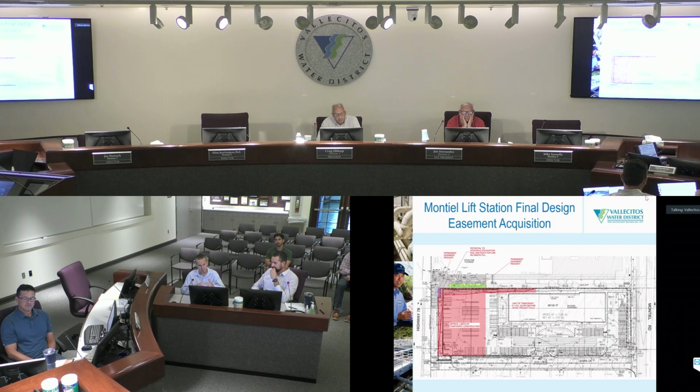Of those 6 projects that we initiated last year, this was already on the books from the previous year. So when we talk about capacity, these types of projects can really eat up staff time as we work through the design, including right-of-way acquisition. Ryan and the staff have been working on this right-of-way acquisition, working with BBK on making sure we're following the process and doing everything properly. It's been quite a challenge. So the next action coming to the board will be CEQA adoption in September. We're shooting for September 7th.